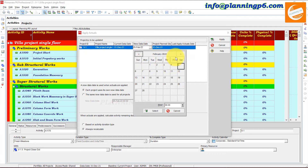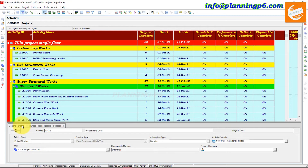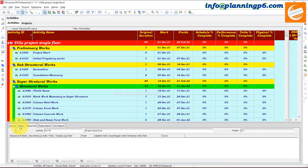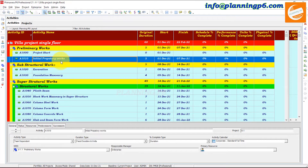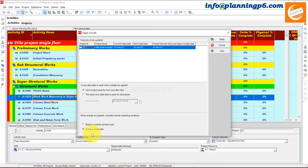You can change the date from here. Suppose we are going to apply actuals on 25th of January. If you select that option you can change the date from here. Next, when actuals are applied, 'Calculate Activity Remaining Duration based on Activity Duration Type' — for example, Fixed Duration. I am suggesting that you click on 'Always Recalculate.'